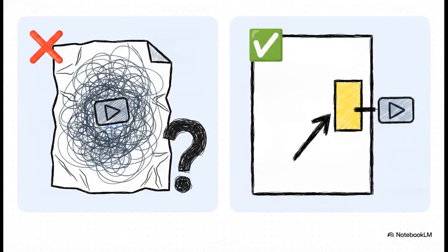Let's look at the stark contrast between these two approaches. If you just write, put the video somewhere here, you are straight up inviting chaos. You're basically playing hide and seek with your own content. Your developer has to guess which video you mean and exactly where here actually is. Instead, use something like this. Builder Note. Place L01_T02_fixed_variable.mp4 below the second paragraph. See the difference there? Using exact file names and explicit positional instructions is going to save everyone so much time, money, and those endless revision cycles.